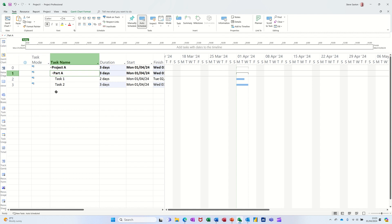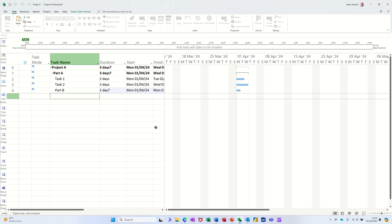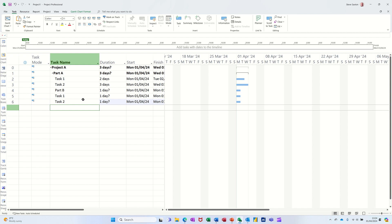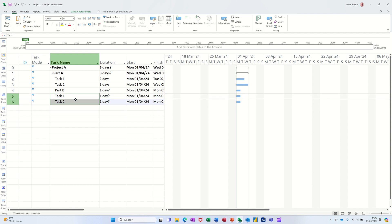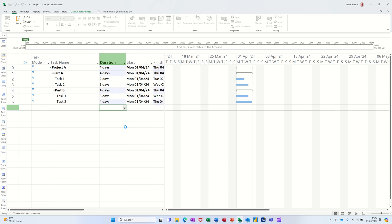The other way to do it would be if I go Part B, press enter on that one, and then go task one, task two. And then I highlight these two tasks underneath Part B, so at the moment they're all sitting under Part A. But if I use the indent tab there, now that's indented those and I'll just put a three and a four a task there just to give some movement.